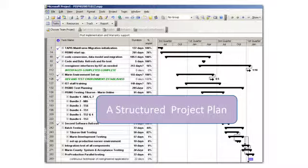So step 1 was to isolate the data schemas out of the old environment, recreate them in the new SQL Server environment, develop technologies to migrate the data from one environment to the other, and develop some technologies to cleanse the data, so if there was any bad data sitting in the old environment, get that out. So Tiburon worked on that phase of the operation. We shipped them a lot of data in the process, and then eventually they delivered us a finished database that could support all the old data in the new technology.